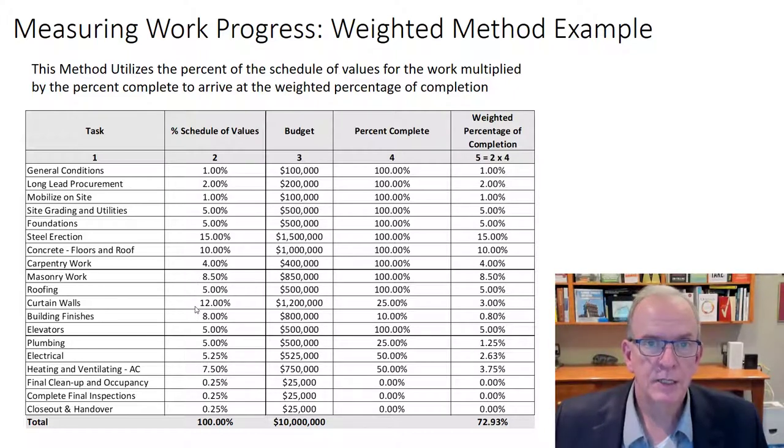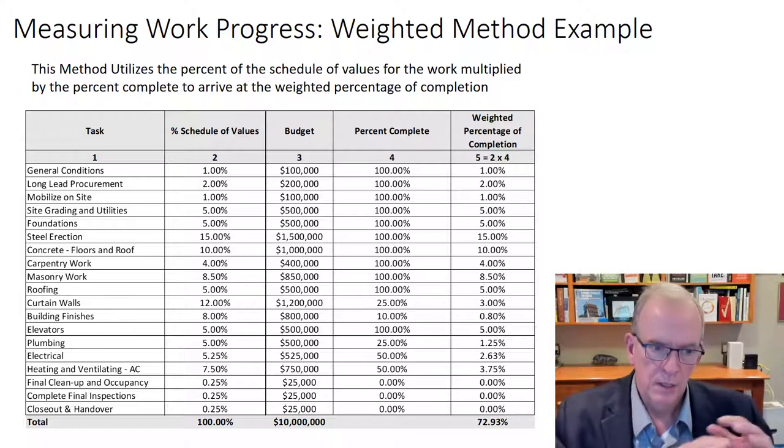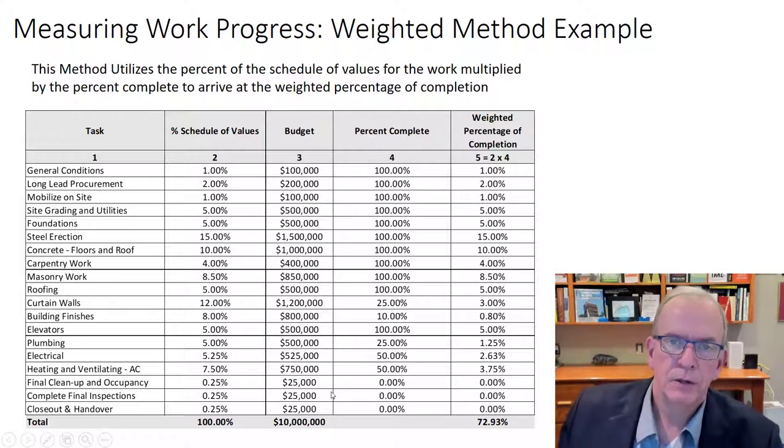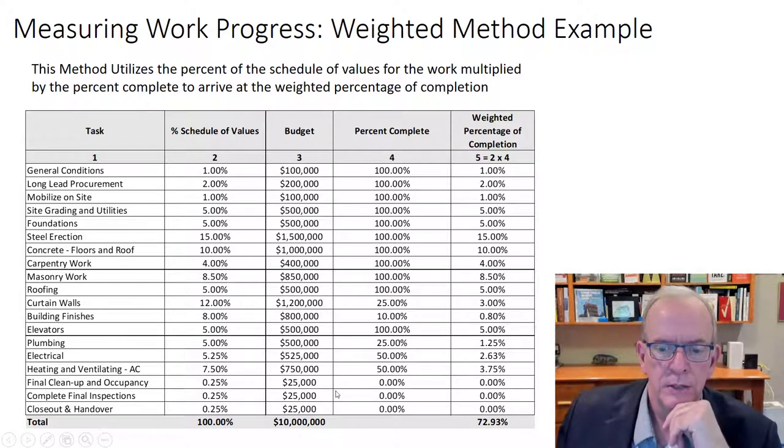And in a lot of cases, that's what you're trying to substantiate with your billings, the progress payments. This is 100% complete, and so that should factor into these numbers, and this should be what we're getting paid off of this total amount. And then again, it depends how you've negotiated, so there'll probably be a holdback amount for lien legislation, etc., but that's the process.